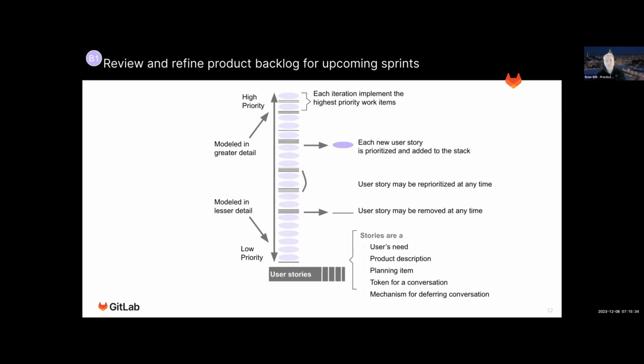And that prioritization happens in different ways. So, for example, later when Max is going to show us the functionality in GitLab, you can actually order the backlog by dragging and dropping things across columns. So, again, that tells you the priority implicitly. So you don't necessarily need a priority field. You don't necessarily need to say there's a priority 1, 2, 3, 5. You can just by the order indicate what the priority is, and any engineer, any project participant should be able to just look at that and say, hey, what's on top is the most important, and that's what we should be working on.